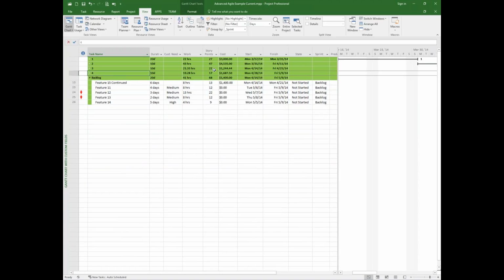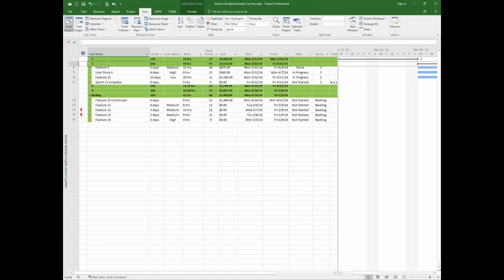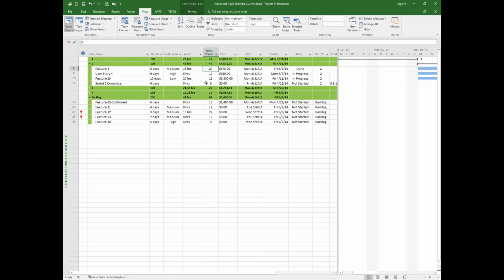Or if I'm talking about area, I go, wait a minute, remember in a sprint, the idea of a story point or hours is that many times you're asking technical teams to do things they've never done before. So asking them how many hours it's going to take might be a little bit harder, but I bet you dollars to donuts, if you ask them how complex it is, they can give you a rating scale.